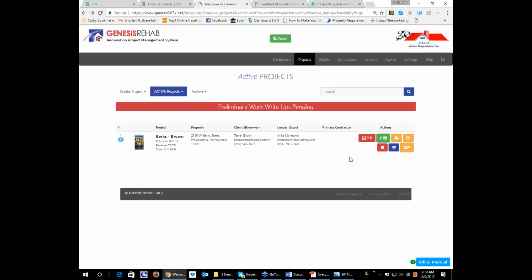Now, your contractor's numbers, when I spoke to him, he said that they did not include permit fees. So the number on my final work write-up will be higher because it will include additional fees for permits and some other comments that he and I discussed. But once I finish making the work write-up, the system will automatically generate a matching contractor bid for him to sign. Are you okay with that, Mr. Borrower? Sure am. Okay, well, the project is going to be $125,000.